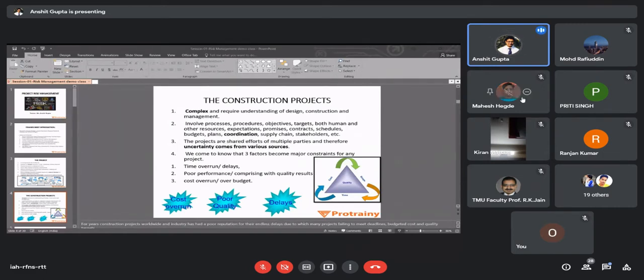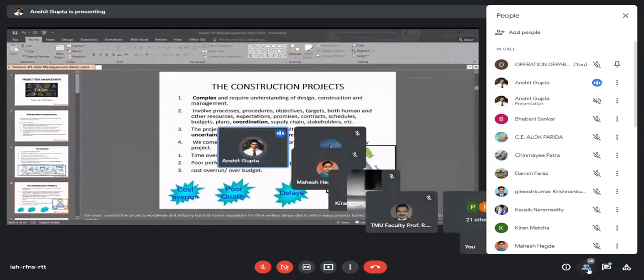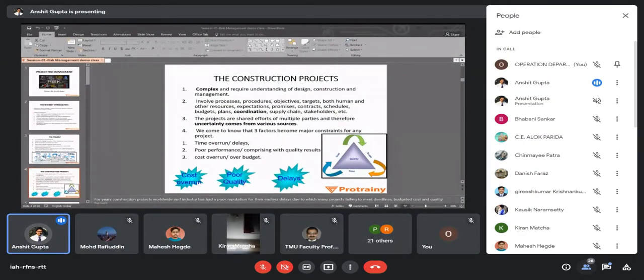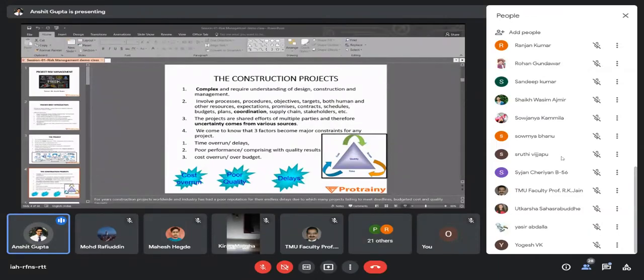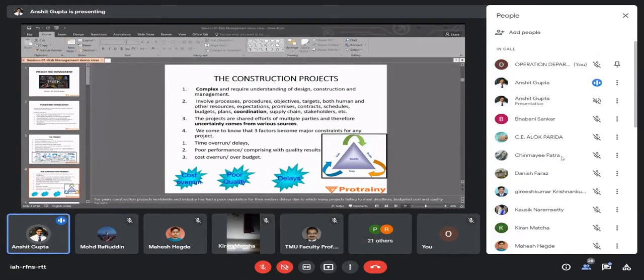If I had studied all those plans in detail, and I had prepared a risk register, where a part of risk management is also designing, where I have checked the designs and I have checked at this stage only that I need my architect to change the drawings, then the amount spent will be very less in changing the drawings in the first phase.